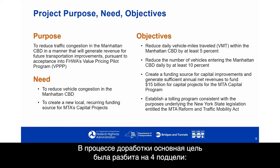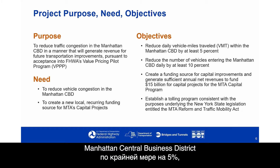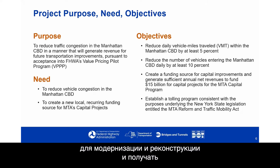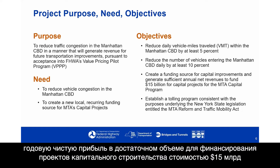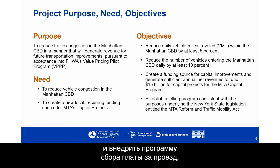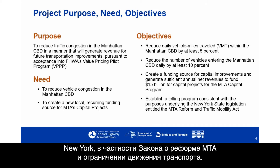The purpose and need are refined through four objectives: to reduce daily vehicle miles traveled, or VMT, within the Manhattan CBD by at least 5%; to reduce the number of vehicles entering the CBD daily by at least 10%; to create a funding source generating sufficient annual net revenue to fund $15 billion for MTA capital projects; and to establish a tolling program consistent with the MTA Reform and Traffic Mobility Act.